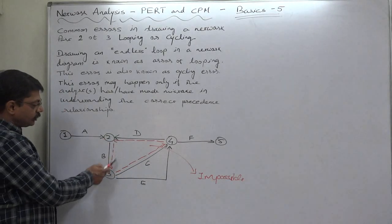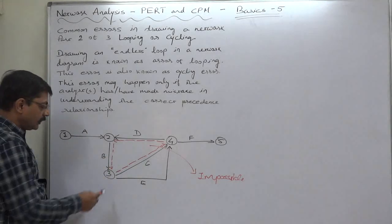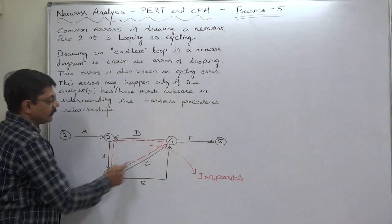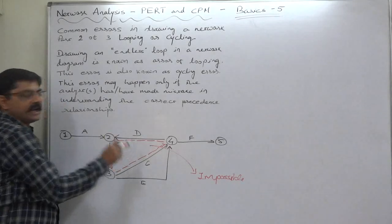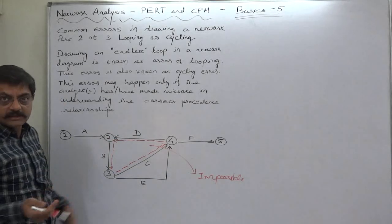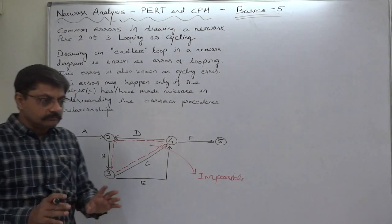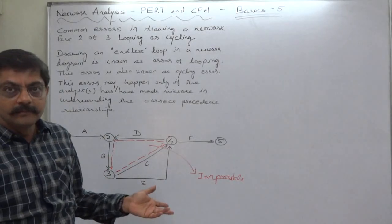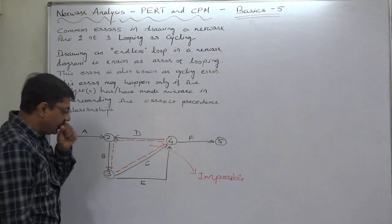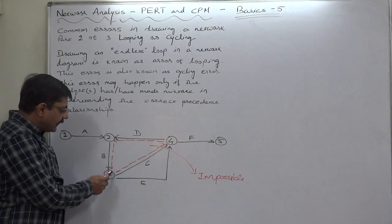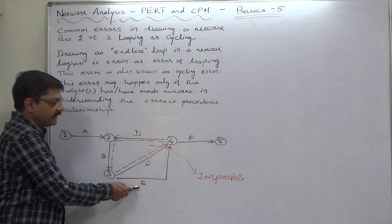Now see the situation of B, C and D. An infinite cycle, infinite loop is there. That means the project or these three events can never end. And if B cannot end, how can C or E start?